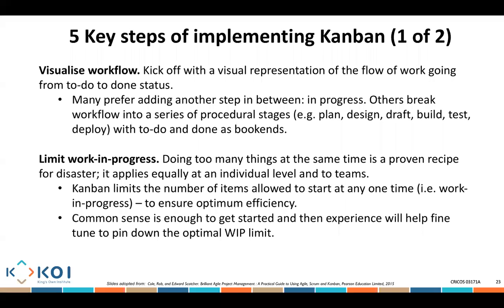Now, many prefer to put the flow of work going from to do to done. Some people, not only to do and done, also have something that is in progress. Some people add different steps such as planning, designing, drafting, building, testing, and deploying. Everybody does it differently. It is your job to decide what is the most appropriate manner to use, taking into perspective all of these stages that might be relevant from your IT project management perspective.